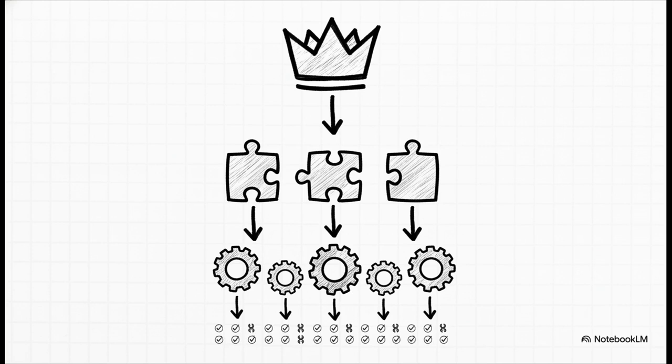But here is a critical tip, straight from the source material: keep this hierarchy strictly parent to child across the different types. You want to avoid nesting a story under a story or a task under a task, because if you create those same type hierarchies, the actual items you need to work on, the leaf nodes, can easily get lost in the shuffle and they just won't display properly on your boards.